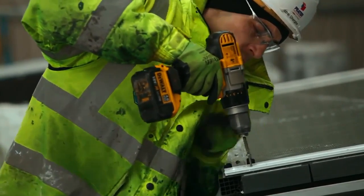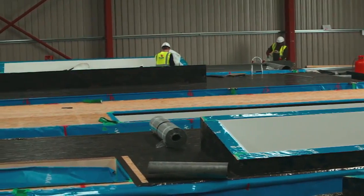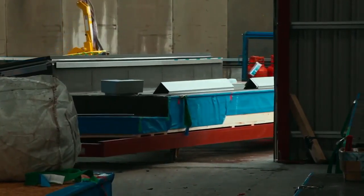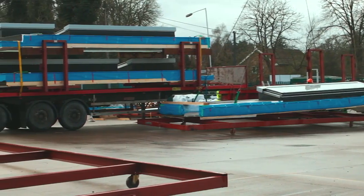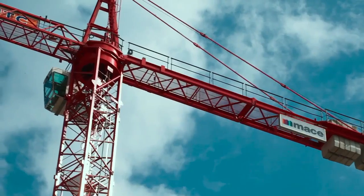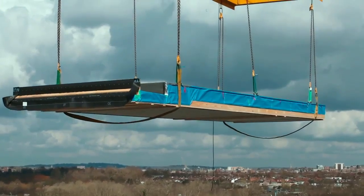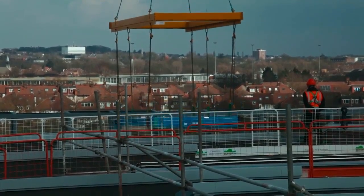On the project, there's an extensive off-site testing regime for both roofing and facade elements. This is driven primarily by the bespoke products that we're using. Although individual components may have been tested previously in different systems, when you put them all together on this project as a build-up, there's no test data to support the performance. We start by doing calculations, but to really provide the validity, get the sign-off from the professional team and demonstrate to the client that the building is going to perform as expected, the only way to do that is to go through an off-site testing programme.